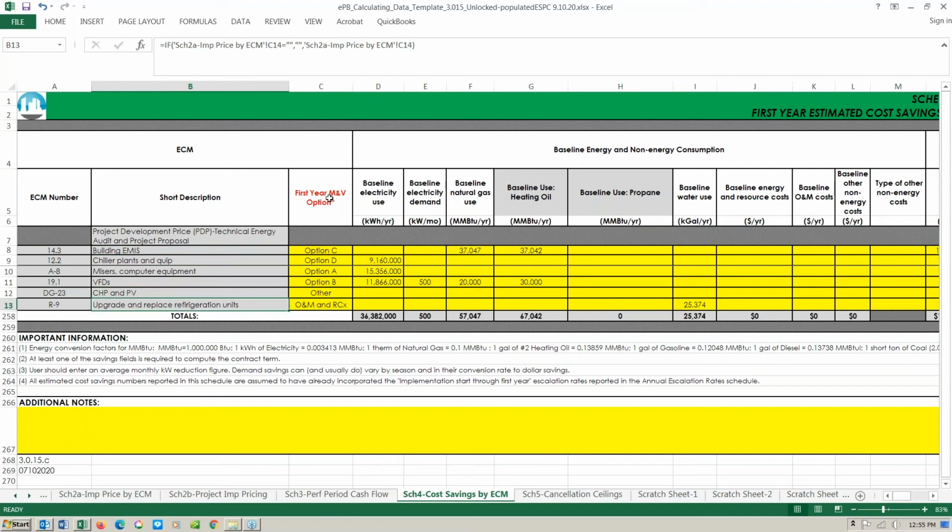Again, just remapped over here into this particular tab. We have a red text column header here. So for the energy savings performance contracting projects, measurement and verification must occur. And for each of the various measures, the ESCO needs to enter which of the IPMVP, International Performance Measurement and Verification Protocol, I always stumble over that one. So anyway, IPMVP, which option, A, B, C, or D?